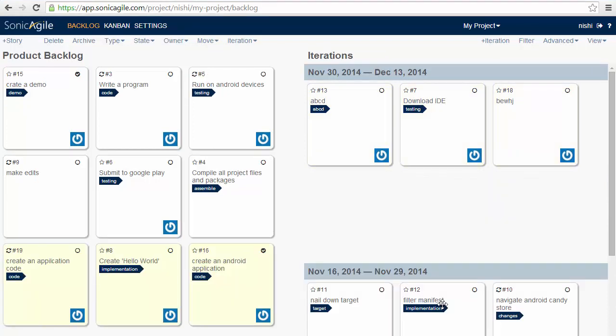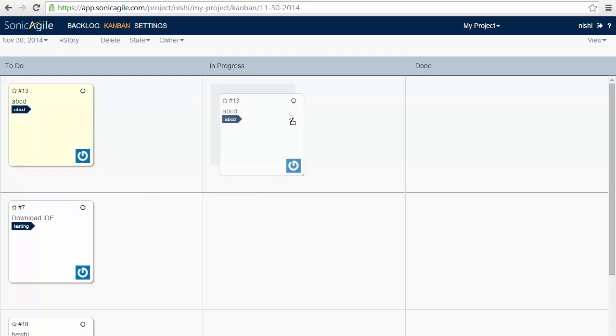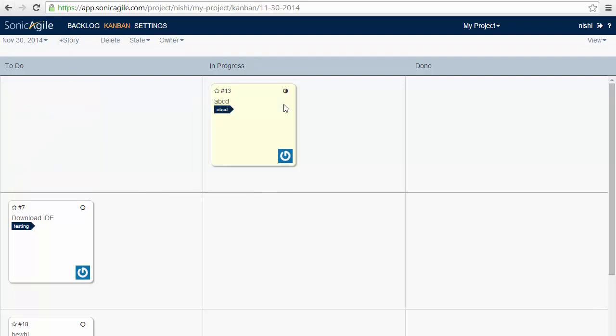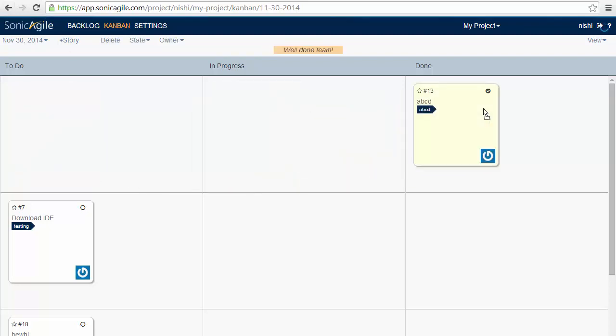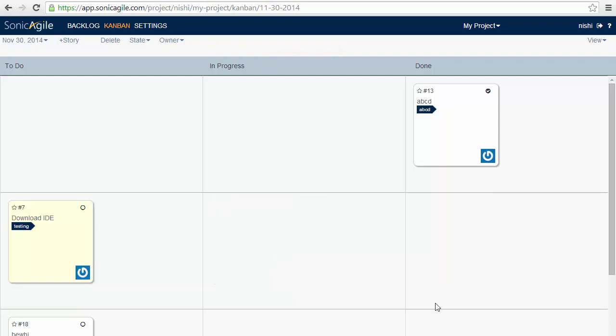The next feature is Kanban. Kanban is also a real-time Kanban. We can use the Kanban to quickly check on the state of stories. For example, you can see whether the story is in to-do, in progress, or done. And you can drag your stories also like this. So this is how you can keep a record of your stories that is in to-do state or in progress or in done.